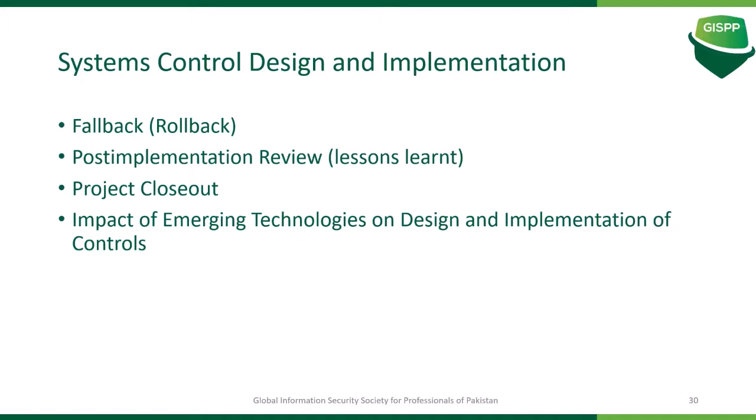And then this is very important. Then comes the post implementation review, which is the lessons learned. When you have the implementation done, what is the post implementation review? It's all about documentation. You need to document the lessons learned, and you need to see what things were missing, what went wrong, why the project got delayed, why it was ahead of time, what new things we gained out of this project, and at the end, project closeout.